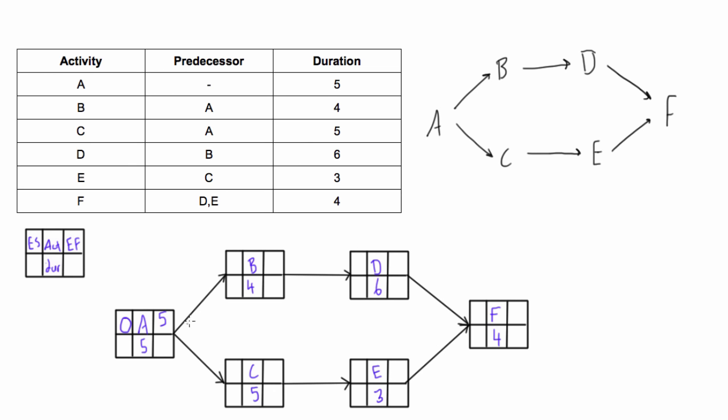We take the early finish of the preceding activity and write it as the early start of the succeeding activity. So we bring the five into both of these places, and then just continue on by adding the duration. Five plus four equals nine, and five plus five equals ten for activity C.